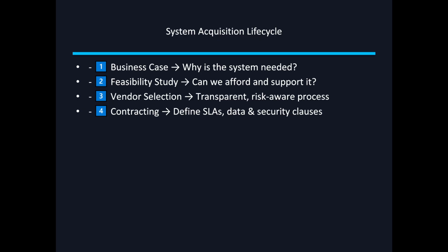Just a story around it. In one multinational audit, a CRM vendor was selected based purely on price. Later, the system couldn't integrate with the existing databases, causing data duplication and loss. That's why CISA emphasizes due diligence: the cheapest option isn't always the best one.